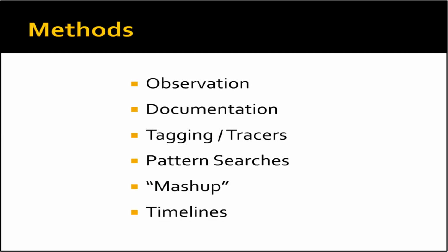Pattern searches can often be a way to track the outcome of a project and determine the project's success. You can use the project baselines as a starting point, along with a case study, to determine if there have been any changes, either positive or negative, as a result of the project's outcomes. This would be a great way to look for unintended consequences that may be a result of the project. Again, these can be both positive and negative, and doing pattern searches within the data can help to find these possibilities.